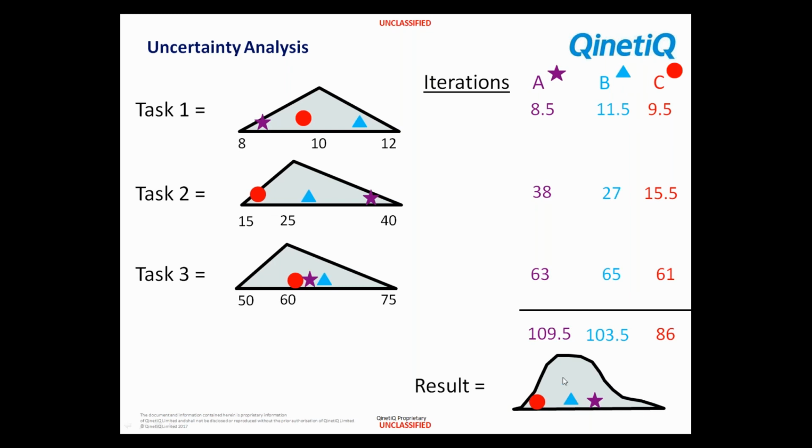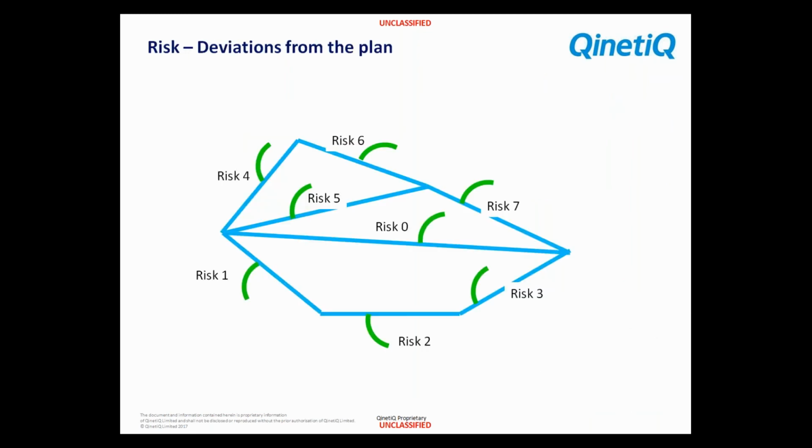If we take all of the area under the curve and we come over to the far right-hand side, then this is our 100% confidence point when we convert it into an S-curve, because all of the project outcomes fell to the left of that budget. So that's how we do Monte Carlo analysis on uncertainty. So let's introduce risks now. I've made it very simple. I know this is a simple example. I've just taken one risk out of a risk register, one risk for one task.